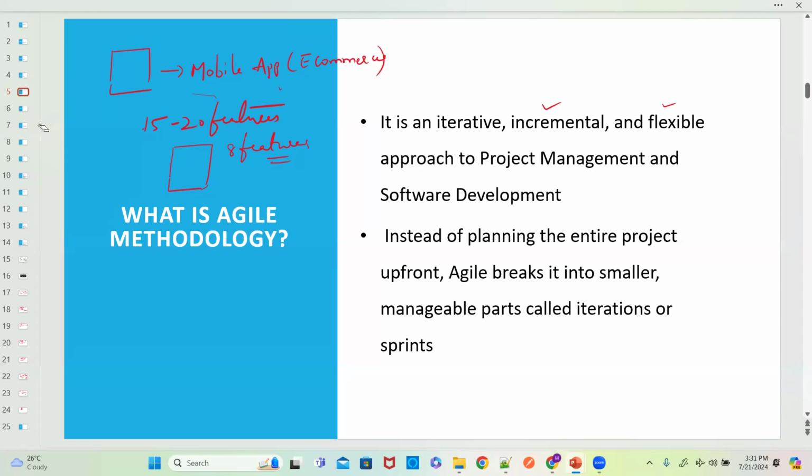We'll start one thing, finish it, and again take some other activities, finishing from the first step to the 4th step, and slowly we are adding the features to the mobile application. Within 1.5 to 2 years, you will add all the features. Later on, if any other new features are required, again you will do that. That's why we call it an iterative approach. Also, it is called an incremental approach. Why? Because slowly you're adding features.